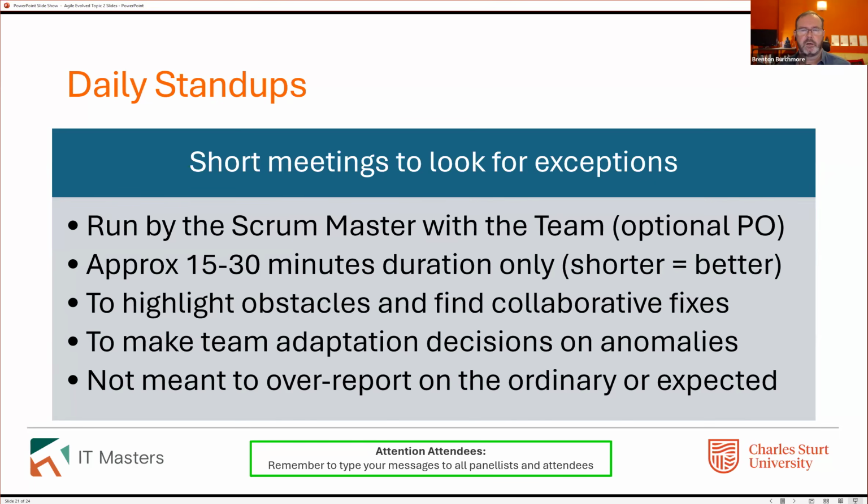It's meant to find obstacles that individual team members have and what collaborative fixes might be necessary, useful, or appropriate. If it's a one-to-one thing where a person says, I'm struggling with this, can the team help you? No, the team can't help you. Then it's not an issue to be discussed in the stand-up meeting. It might happen immediately after.